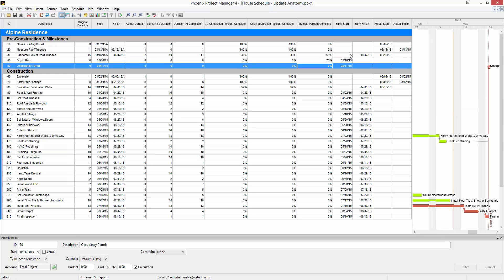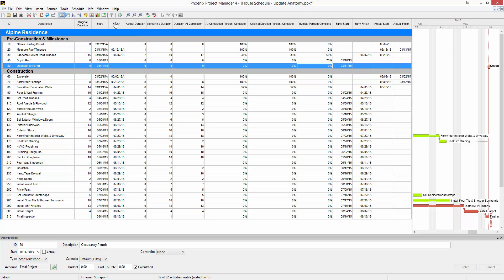You'll also notice here that I have an early start, early finish, actual start, and actual finish column. In your schedule by default, the columns that we show are the current start and the current finish. The current start and current finish are a combination of both these early columns and the actual columns. Before an activity becomes complete or any progress is made, an activity will only have an early start and early finish. Once you start completing work, the date moves over into these actual fields.